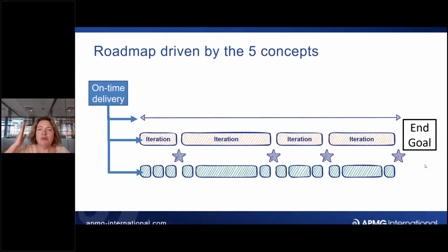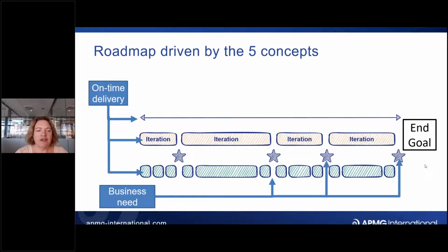But we retain flexibility over exactly what we deliver, while keeping the constraint that we will deliver on time, because that becomes the basis around which we prioritize. Because we're saying, well, look, I've only got 10 days left. There are 3 things I could do. I will do the most valuable one.